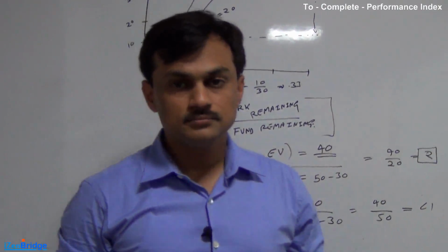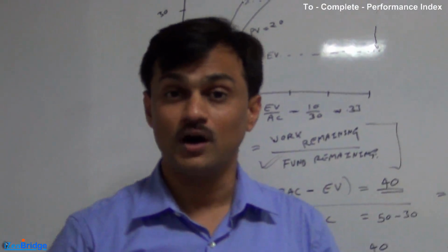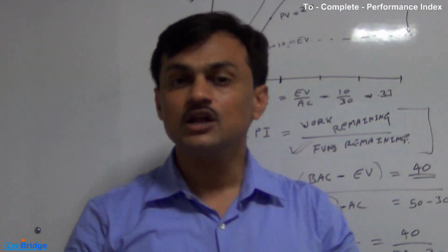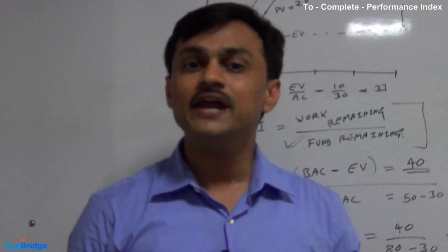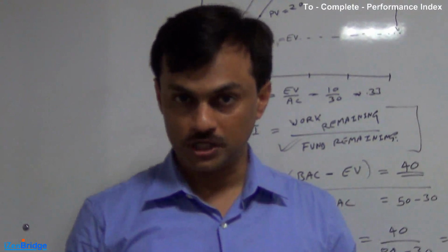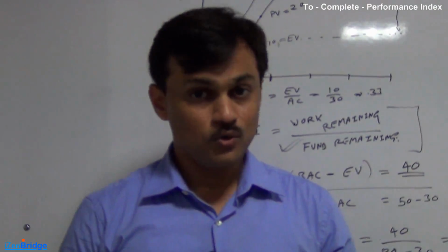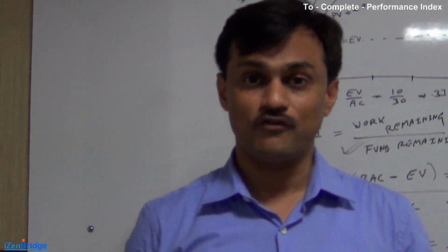Now, a lot of the time, the To Complete Performance Index is also known as the asking run rate. So people who are cricket fans may relate it to the required run rate in order to win the match. So it's a required cost performance index in order to get the work done in the available amount of money. So I hope this video has helped you in understanding the To Complete Performance Index.